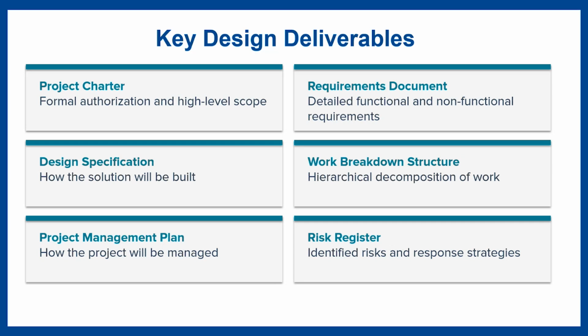The next one is the work breakdown structure, also referred to as WBS. The WBS breaks the project into smaller, manageable pieces or tasks. It includes deliverables, work packages, and activities. A WBS provides a clear view of all the work required, making scheduling, estimating, and resource planning easier.